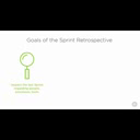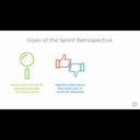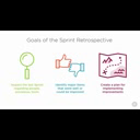First, we want to inspect the last sprint and understand how the people, the relationships, the processes, and the underlying tools in the sprint work together to allow us to deliver the product increment. And then we'll want to identify any major items that went well and anything that could be improved. So once we identify those items, we can understand what we want to improve and build a plan for implementing those improvements in the next sprint.